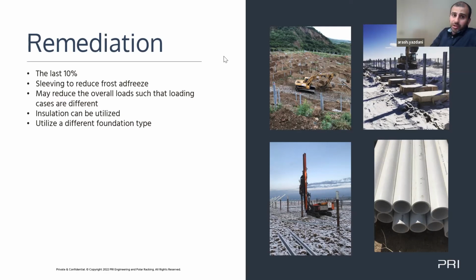So, absolutely, we want to look at the geological conditions. In a lot of cases, there's going to be what I would call a transition zone between one major geological deposition and another major geological deposition, in which maybe we had to draw a line in the array so that they could make a procurement. But we all know that the line that separates zone A and B is a little bit gray. And so in those cases, maybe we proposed a driven pile up to the line, but we find that the helical is required a little bit further south from that line. So utilizing different foundation types is often the way to go. If you've got a different mix, having the ability to bounce your foundation types around, and sometimes it's hard to digest maybe an added cost of going out and buying an additional foundation element.